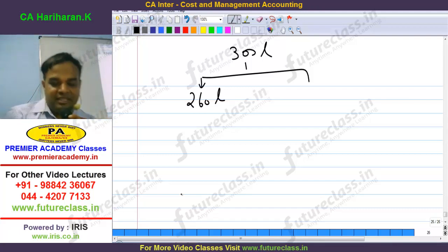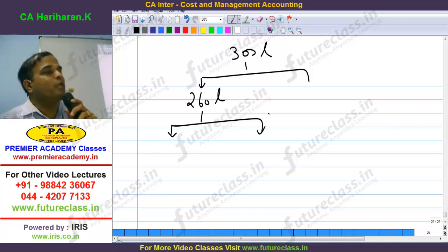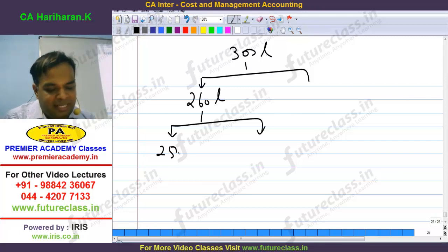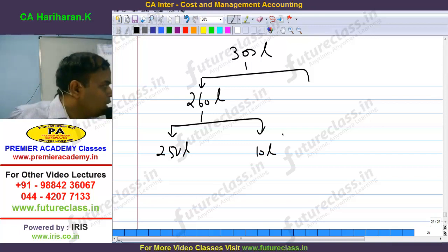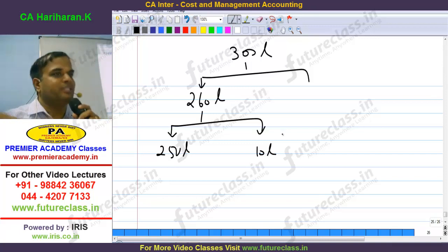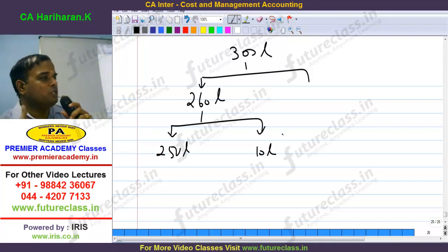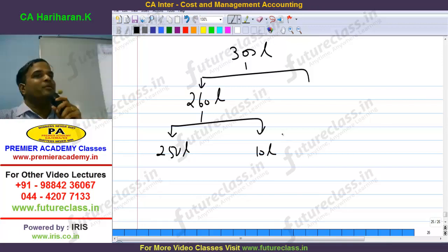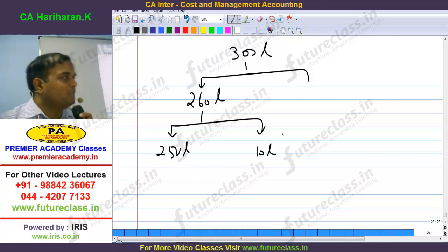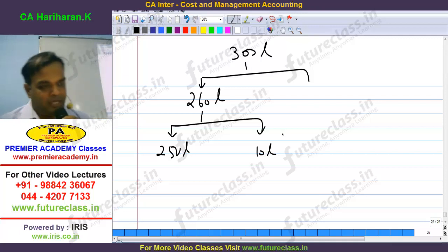After verifying the same, he says, out of 260 lakhs, whatever I consider, everything cannot be accepted. 250 lakhs only is as per the agreement, and 10 lakhs is not as per the agreement. Even if you verify clearly during house property construction, the window was supposed to be on this side, or the kitchen was supposed to be there, but we make small modifications. Therefore exactly 100% we may not accept. Substantially they are accepting, but a few percent is not as per the agreement.